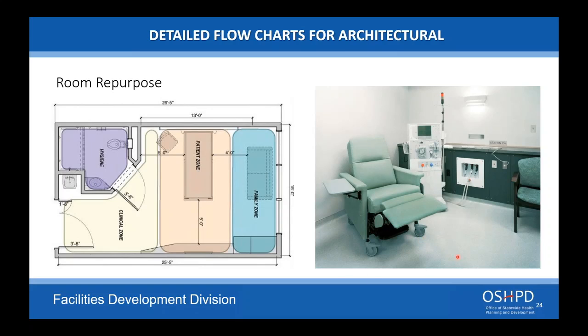So your requirement is within the walls. Now you do have new plumbing that may go in, new electrical. You may even have to adjust the air changes per hour, the air volume coming into that room, new finishes, etc. Your scope of work is limited to that room.